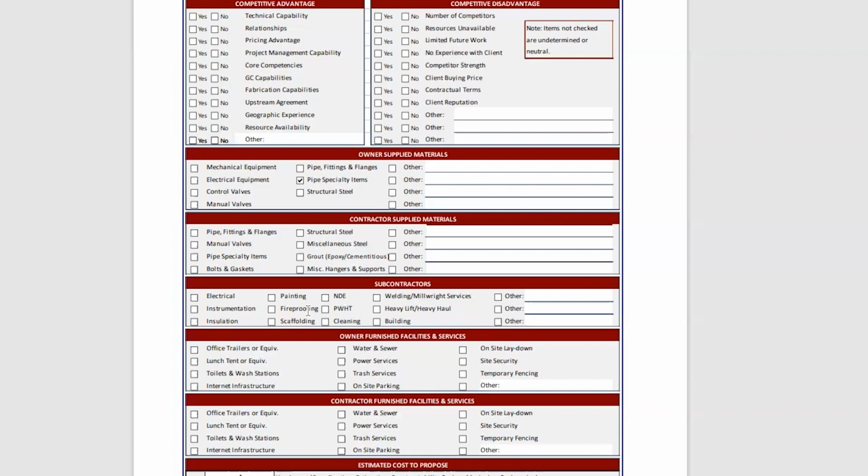Yeah, and I know when we do it, we try to bring up those issues after we've executed a contract. The crews that we used at Cajun were more simplistic crews, where we might have a crew of 5, and it's just 2 journeymen, 2 apprentices, and a foreman, and that's it.